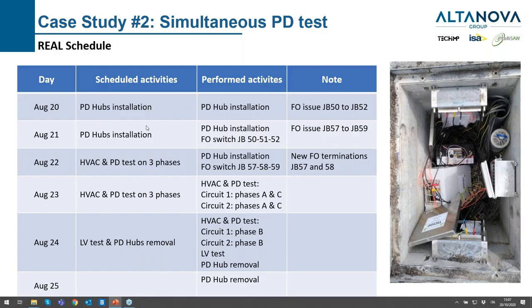We had two days of PD apps installation and troubleshooting as per the scheduled activities. We had to use the morning of the third day to fix some problems with the fiber optic. Then we were able to test all six phases in less than two days once everything was set up.